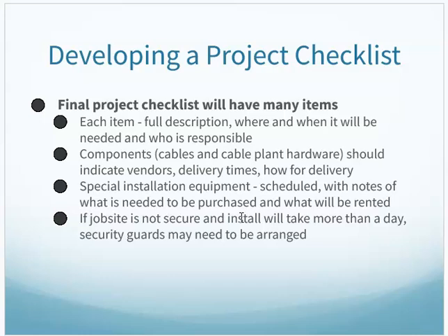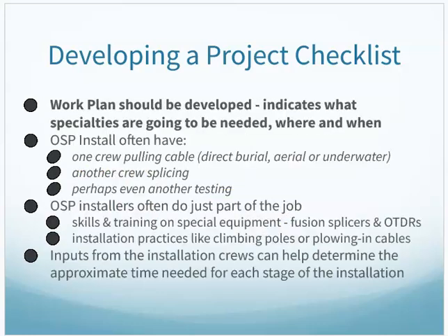And it might even need to be a contractor that you're hiring to do that. In some job sites, there might need to be security for the equipment that's being stored. So that would need to be planned for. So a work plan should be developed, which indicates what specialties are going to be needed and when.